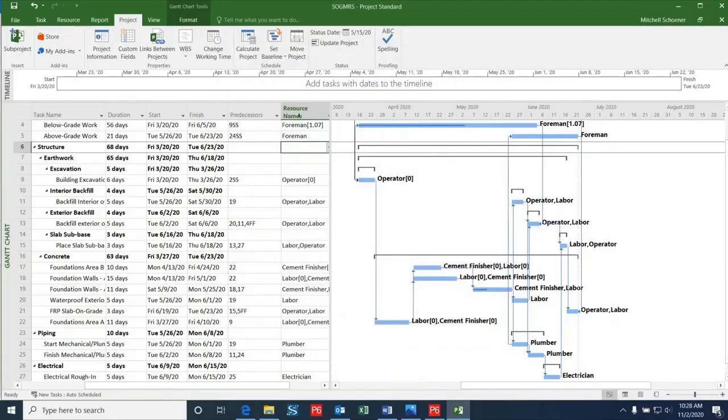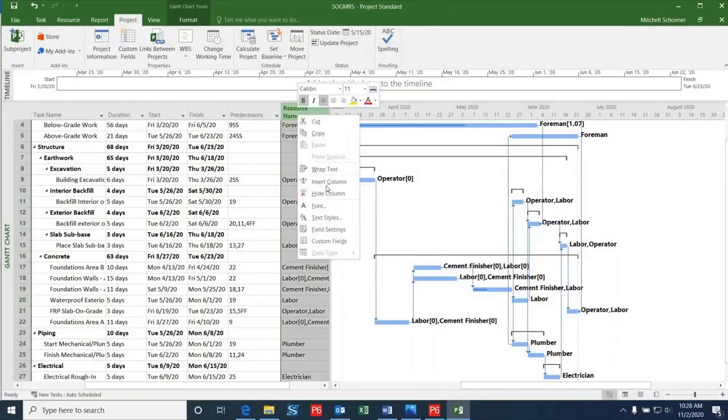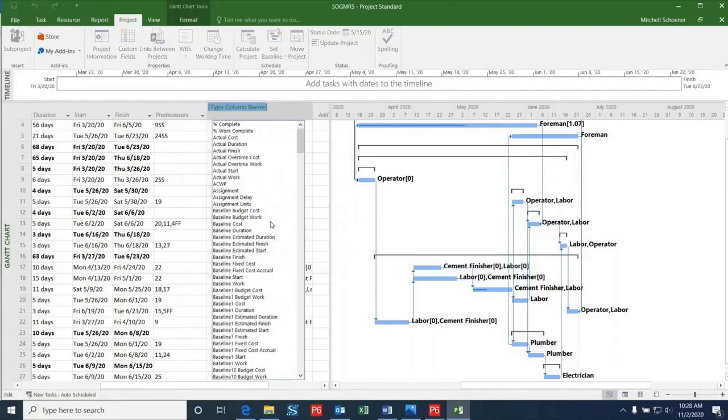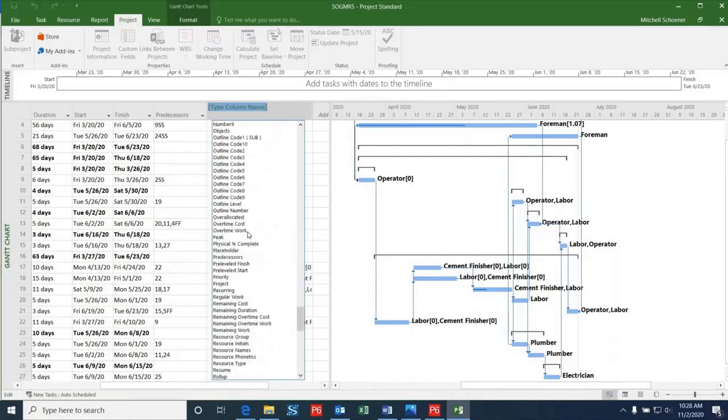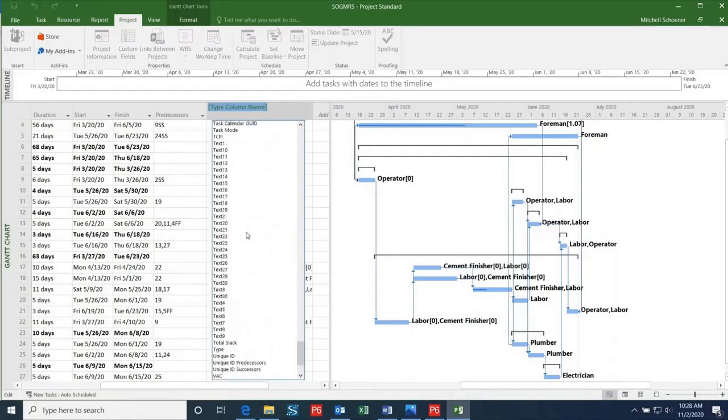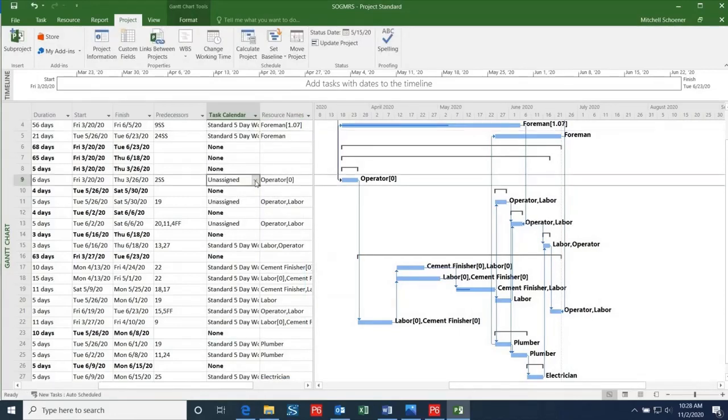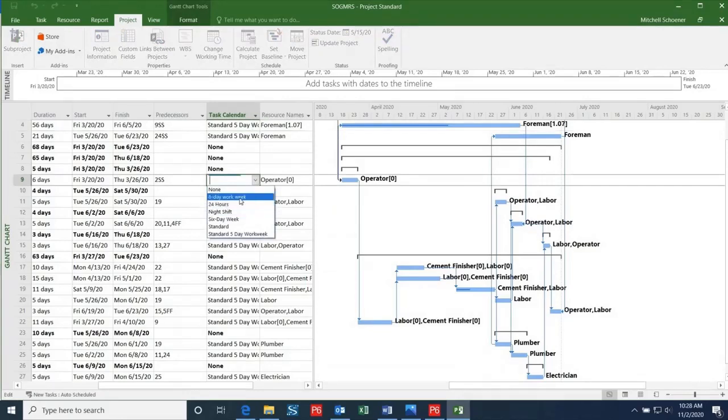Now I'm going to add in a new column for this updated calendar and I will choose Task Calendar. As you can see, the activities that had the six-day work week in P6 are now blank. I can go in and change these to the six-day work week so that the dates will line up correctly.